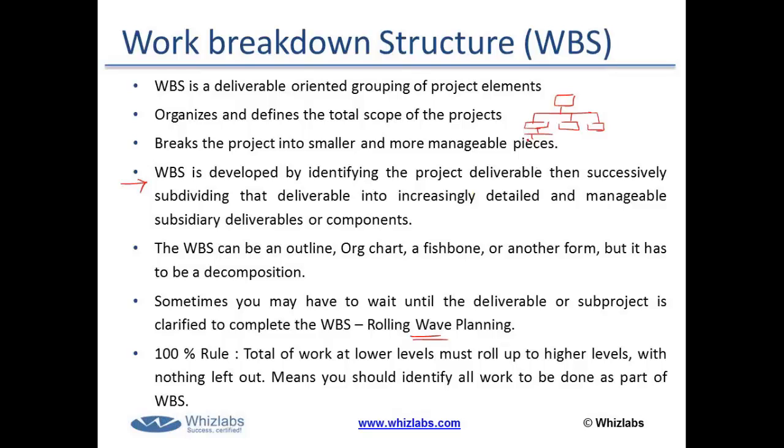For example, let's say my project is about upgrading 500 desktop computers from Windows XP to Windows 7, and then we would also need to release the patches for the applications that we would install on Windows 7. Now, before we actually create a test environment with Windows 7, we cannot identify what all activities are involved for the application patching.